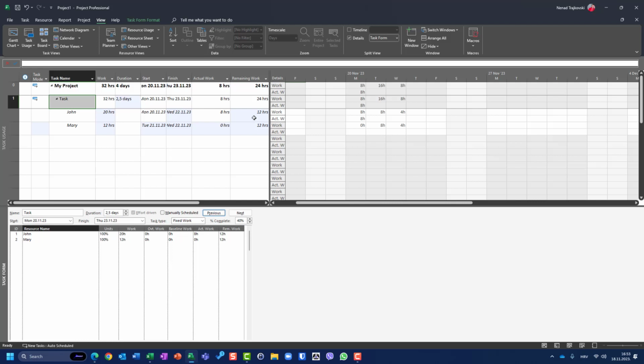So let me explain this situation. First of all, I had a task which is 4 days long, which is 32 hours effort, and all that effort is assigned to John. Since this task is 25% done, it means that 8 hours are done, and the remaining work is 24 hours.